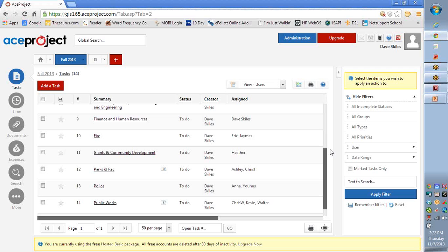As far as the travel costs, we didn't go through the effort of actually looking stuff up online. We just ballparked it based on past experience. About $300 for airfare, $120 for hotel, $70 for a car, and $60 for meals. And again, that's basically one overnight trip.